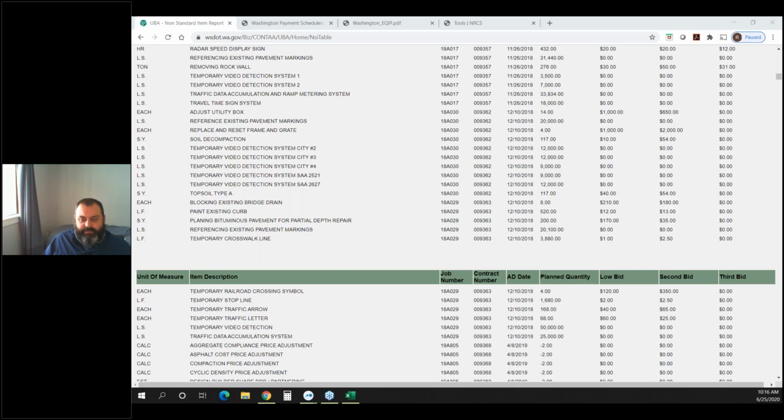And it's hard to know that's happening until you actually start getting bids or quotes, unless you keep an awareness of what's going on out there, or say you're doing a whole bunch of these projects yourself, as a district, you've got 15 projects in the hopper, and you have 3 contractors that do this work pretty regularly. You may find you have a higher cost that year versus the following year, when those same three contractors may not have a bunch of jobs.